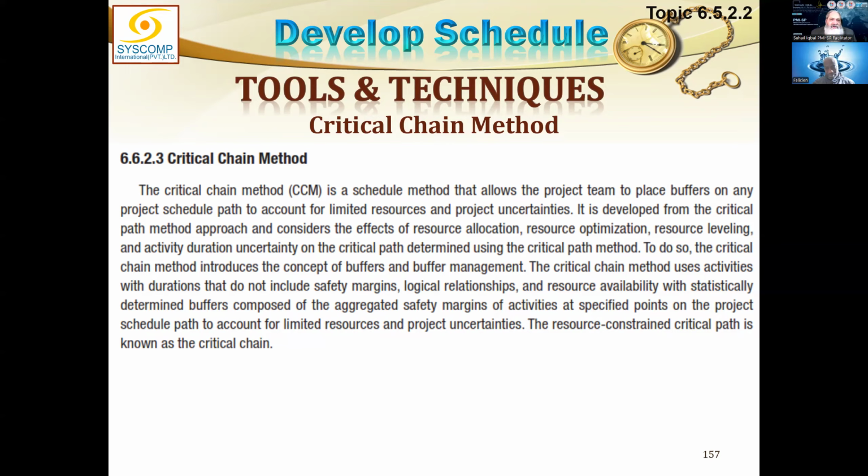Although the original durations allocated to them will not change, what I'm doing is a 10-day activity is given only 8 days. On the discretion of that person, 2 days have been deducted from there, but not deducted from the original duration. They are considered as a buffer.